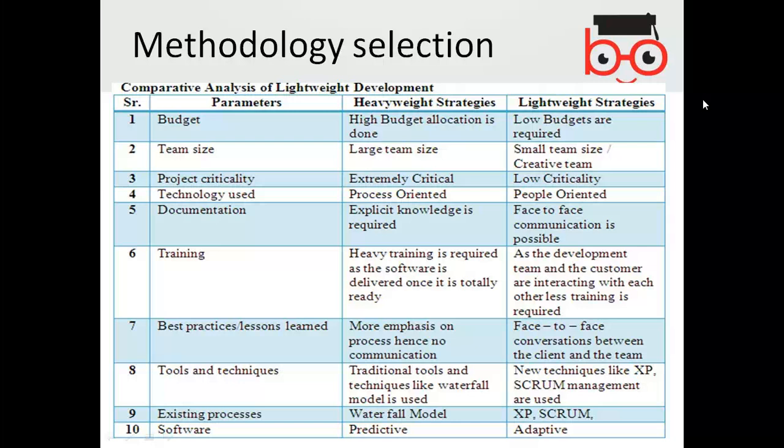So obviously you need to spare the resources in advance, so a high budget is required. However, if you want to start with the prototyping method, iterative methods, then even if it is a very big project, you can start with a very small quantity of team members, and they can produce the prototype, and you can start with, and really can attract the market. And at the time of the start, you need only a low budget.